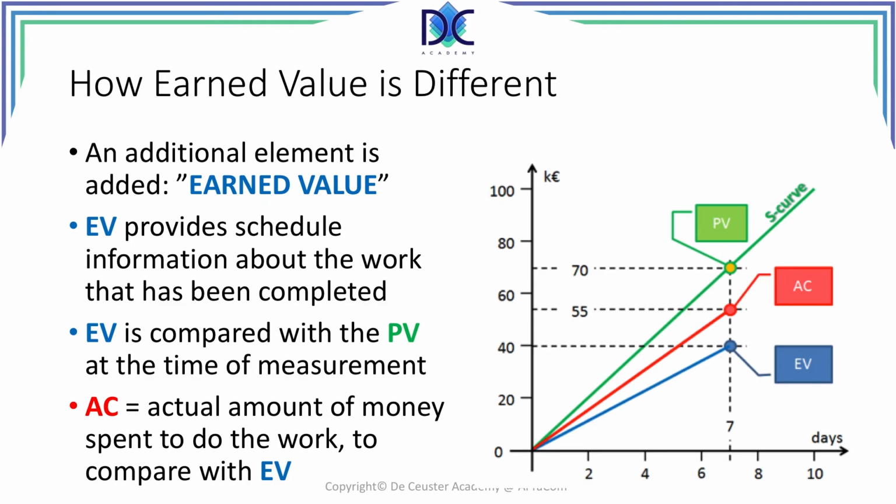We have to look at the S-curve now, looking at how many deliverables we created. In this case, we see that we are behind schedule because we created fewer deliverables than planned. On the other hand, we put the actual cost. How much does it cost to create those deliverables? In fact, we pay more than estimated, so our project is in fact over budget.